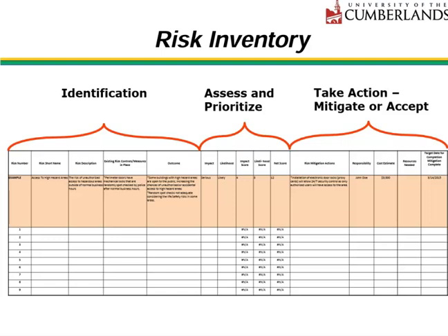Now the remaining columns document our response to that risk. So risk mitigation actions describes what we're going to do. In this case, installing electronic door locks with proxy cards. And then responsibility. The responsibility column assigns ownership to a specific employee, John Doe in this case. And then the cost estimate quantifies the investment needed, so $3,000 for this example.